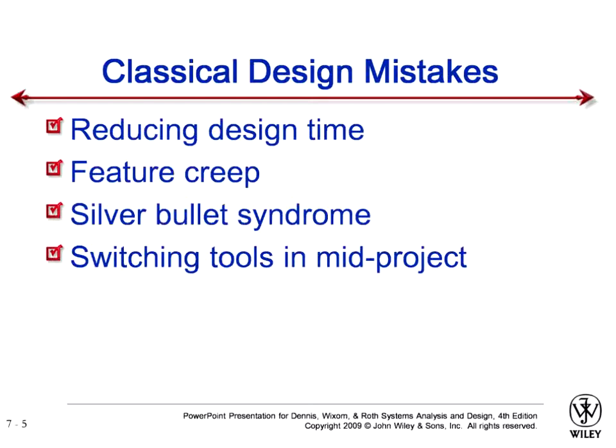Whenever changes come into the system, they increase the total time and cost of your project. So it is better to include only the changes which are vital. Those should be incorporated, and the changes which are not vital should not be incorporated. So be careful and watchful about feature creep.